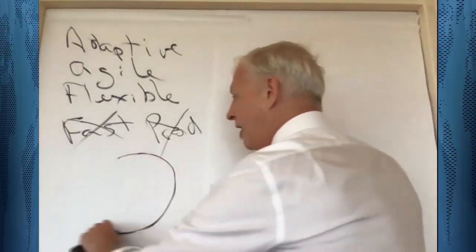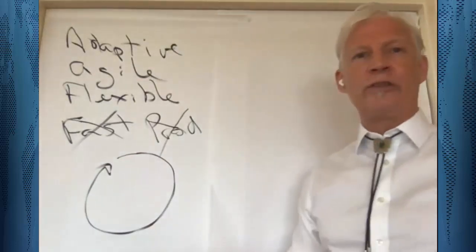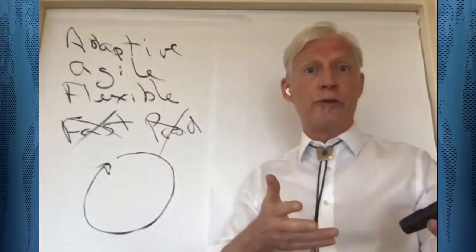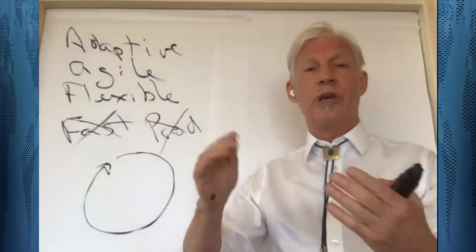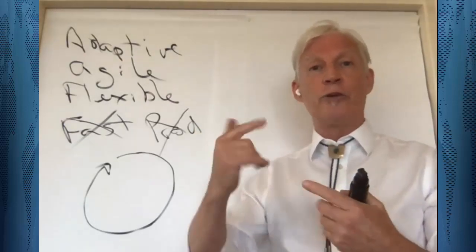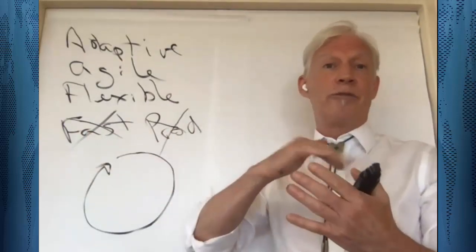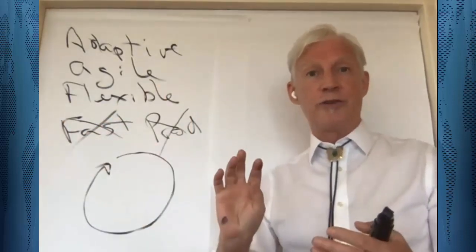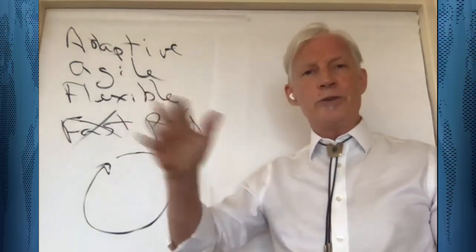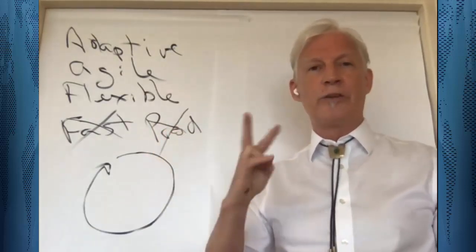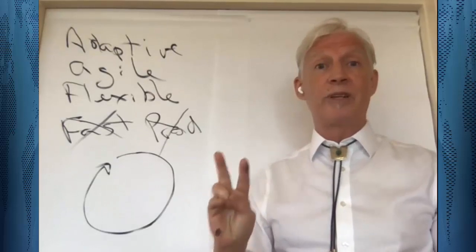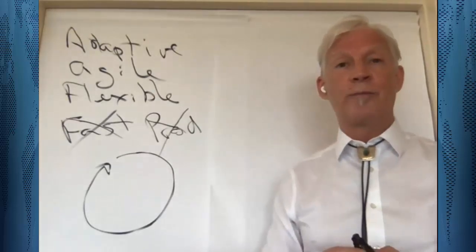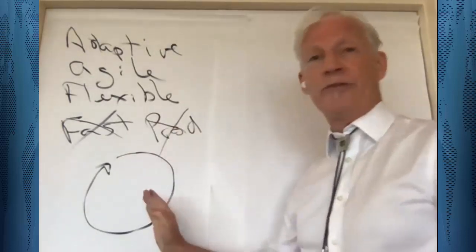If we're going to have a loop-based system for development as opposed to a sequential approach, a traditional sequential model, which is plan-execute, if we're going to move from that plan-execute model to a loop-based model of scientific method, hypothesis, experiment, data, confirm, disconfirm, change direction, then we understood in the early days of this movement that there are two preconditions that have to be in place for this kind of approach to work. And these relate to adaptiveness.